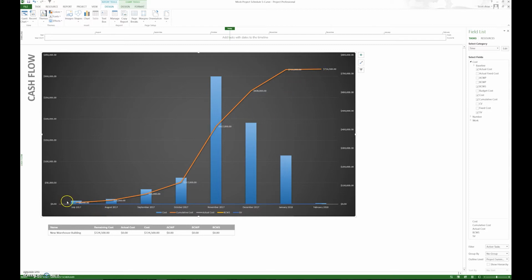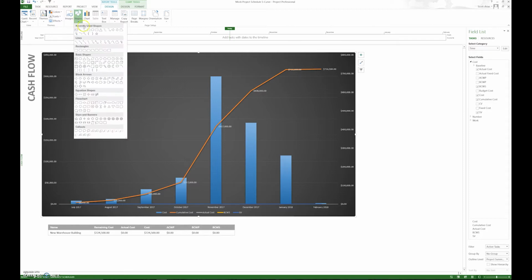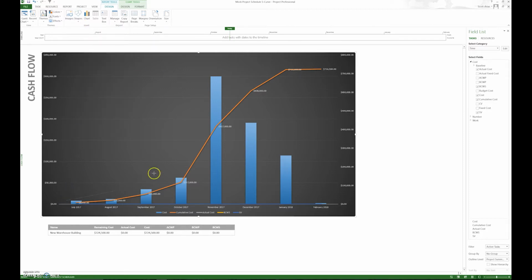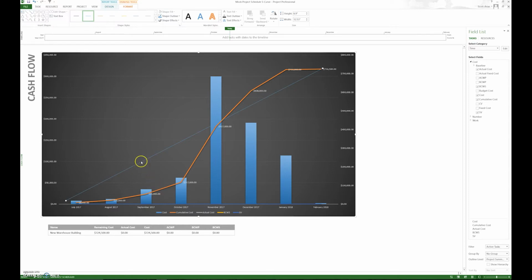So by adjusting numbers, we can plot a line straight across here, and we want to look at the difference between that line and our curve, and a good way of doing that is just by drawing a line, right? If you drew a line straight across from beginning to end, the difference is between what we actually are and what we hypothetically are. We want to get our S curve as close on the bottom end to this line as possible, within the constraints of what we're going to be billing for the clients or whatever.